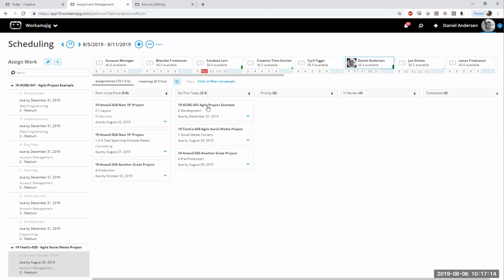So you can kind of see the hourly allocation. We'll talk into those. That's really more what the staff schedule would traditionally be concerned with, the number of hours over a weekly or daily period a user has assigned to them. So if you're moving tasks between these columns, it won't make much of a difference. But the only major impact that you'll see when using these screens is, of course, if you mark things as completed and they still had time resourced on them, they'll basically no longer resource that time for that period.